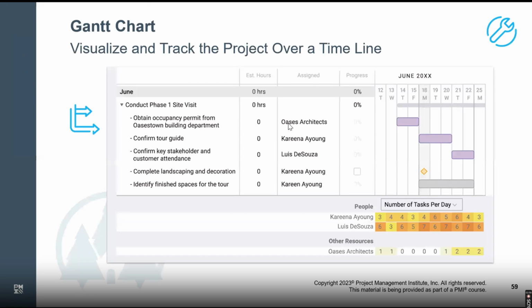This is what we call a Gantt chart. The Gantt chart represents the activities, the tasks you have got, and the timelines are represented in terms of bars. And look at this, this is a milestone, an important event, something important happening there. You can represent those milestones with this diamond shape. Barring that, the entire Gantt chart is all about these bars, which represent the task activity. This is ending here, this is starting here. These are all finish to start, finish to start. But all in all, this will be done by your tool. Whatever tool you're using, it will take care of it.